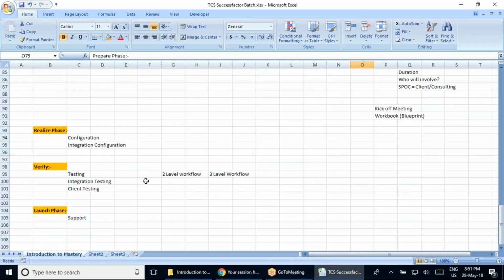So if they are asking you for too many changes, in that case you can approach the manager and inform them that these are the changes which you have already done, and these are the further changes the client is asking, so let me know what has to be taken further. It will be completely the manager's call how he wants to proceed with all these details. So here you will go ahead and do the change management. Or maybe in this case they can also do one thing, they can say let's go ahead and launch it here. Maybe this is just a minor change.